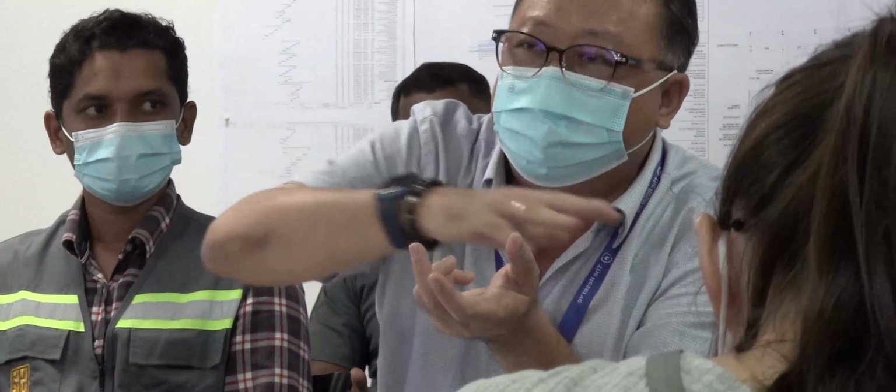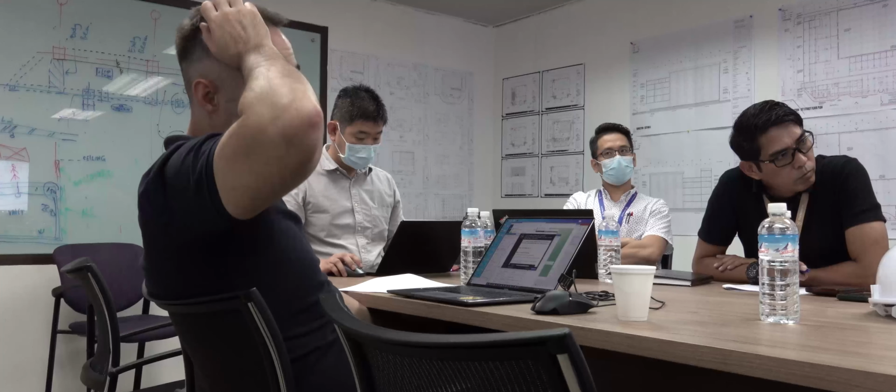And I had a number of meetings with our main contractor, and we made it clear to them that we want to set certain targets, which were set for January 2023. And if you can meet these targets, we can proceed. But if you do not meet these targets, you have to be prepared that we might have to exchange main contractor. And along the way, we supported the main contractor in a number of different ways.